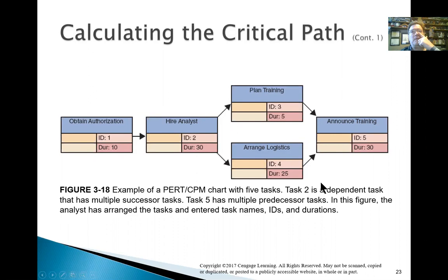Well, if this became 12, that pushes the duration. If the duration became 12, that pushes everything back by 2 days. Okay? If this gets pushed to like 40, that pushes all these guys back by 10 days. If this gets pushed to 30, it pushes everything back by 10 days, or 5 days. And obviously, this is at the end, so if this becomes 100, then the project's delayed. The only one that's not really that pressing is this project training. Sure, they said 5 days, but we can go as far as 25 days and not actually have an